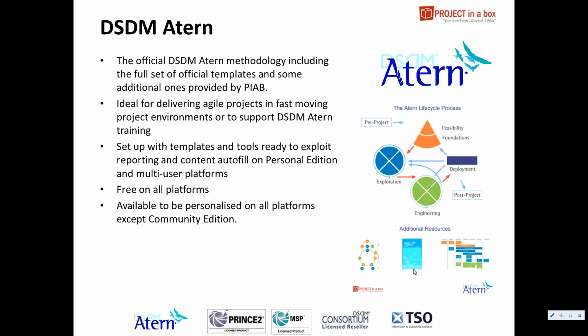DSDM Atern, this is an agile method. It uses the same sort of approach of a project level of documentation, identifying the requirements, and then iterations and time boxes as we cycle through knocking off the most important requirements to deliver the project successfully. Again, standard across all the range of products, and it includes a set of guidance material as well.